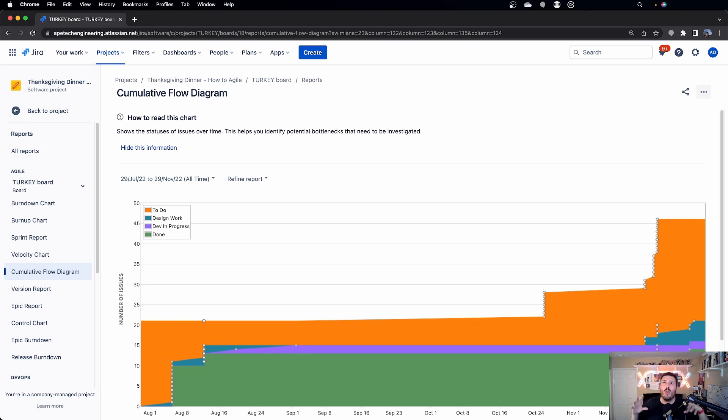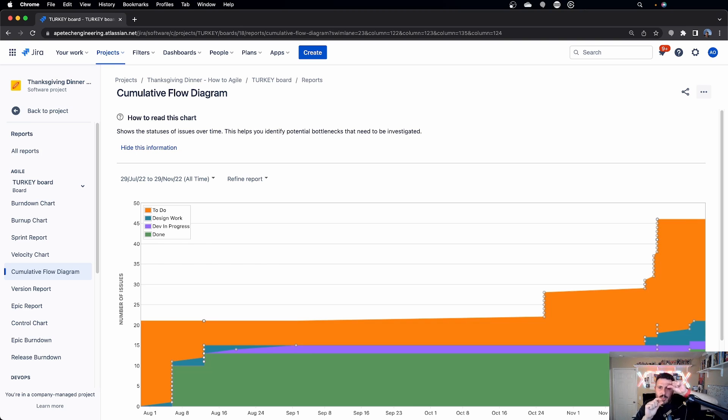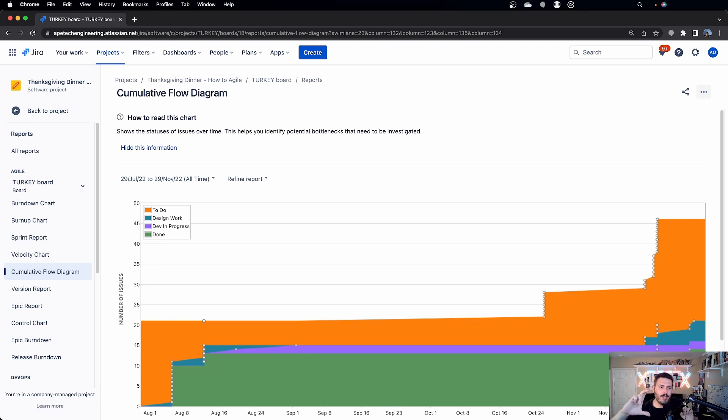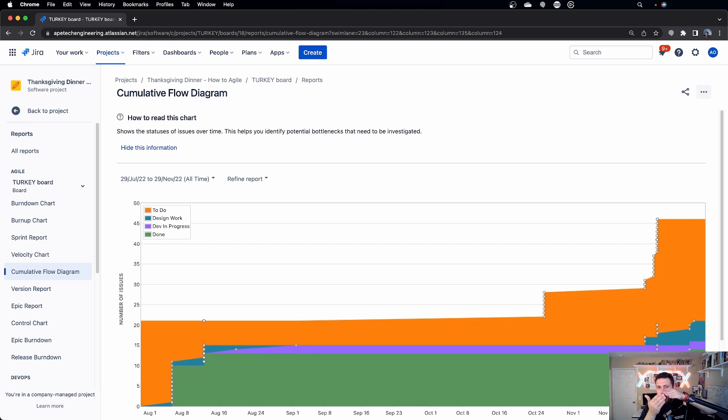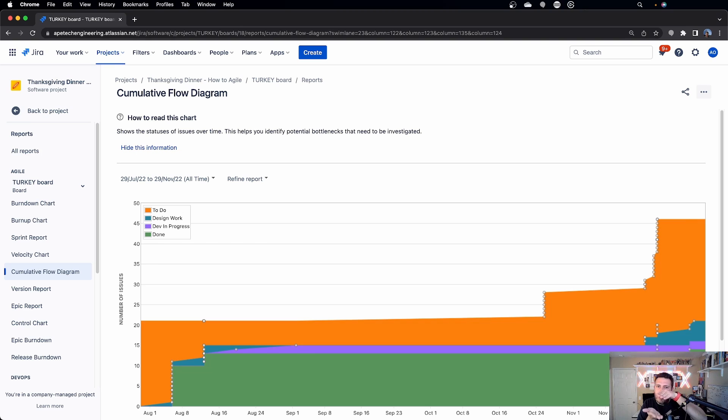And so what I would expect over time is for the orange to get smaller, the teal and the purple to be pretty consistent, because if our teams are always delivering the same amount of value, these two colors should be pretty consistent because one day our team shouldn't have like 50 things in design and one day the team shouldn't have like a hundred things in dev in progress. And these should be pretty consistent throughout the life. And if they're not, if all of a sudden you're seeing this happen to those in-progress statuses, then that's a red flag, because now you're seeing that there's a bottleneck because the team should be pretty consistent in those middle in-progress ones.